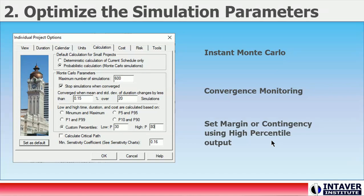The setting for the number of iterations and Convergence Monitoring — more is not always better. Convergence Monitoring will stop the simulation once the results have converged; that is, any additional iterations will not statistically change the results in any significant manner. Finally, setting the high results to match contingency or margin levels will simplify the reporting of the results.